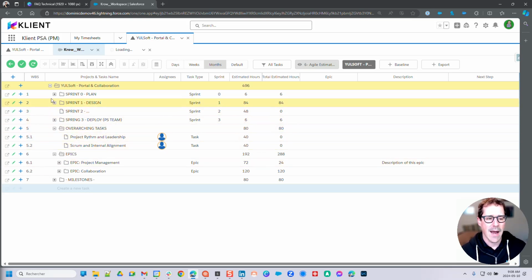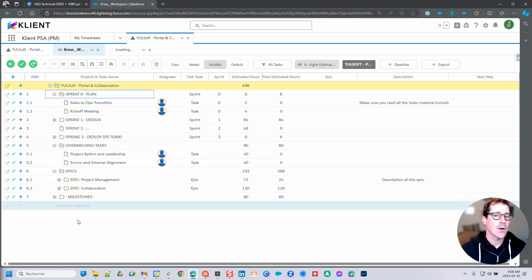You might have some preset sprints for the intro and the outro of the project. For your sprint one, you're doing your planning, sales to ops, documentation review, preps, and stuff like that. Usually that would be a set one that you would have every time you start a new project. Outros like project closeouts, lessons learned, and stuff like that, usually you want to have those in. So using templates so that when you spin up a new project you get that set structure is very efficient. You can spin up a new project with a few clicks. So even if you're agile, project structure is very important, and you should leverage the template features here.